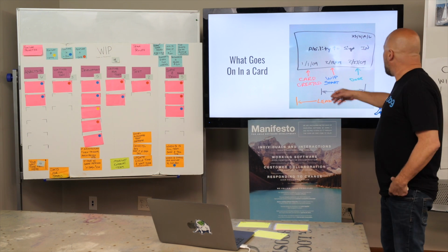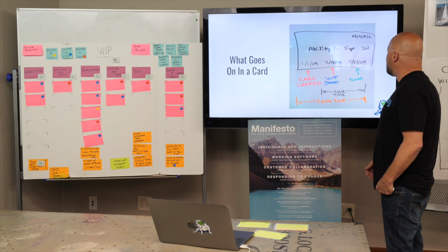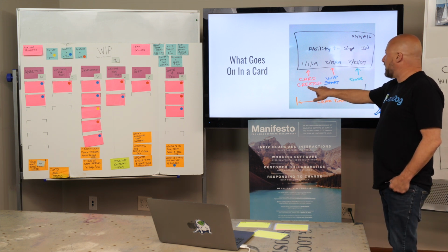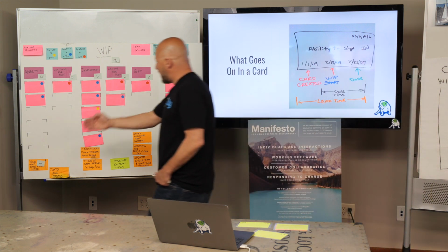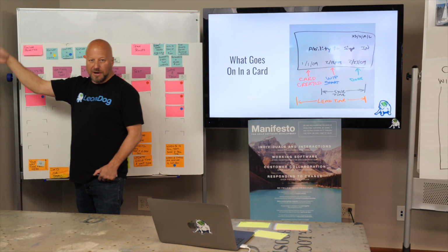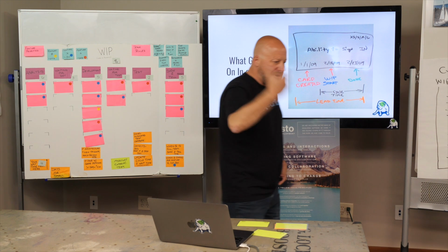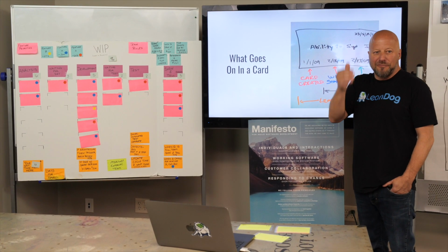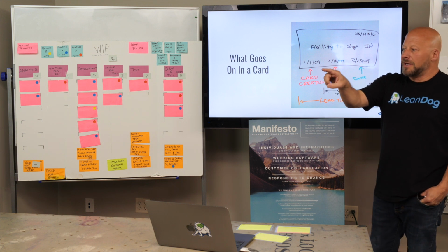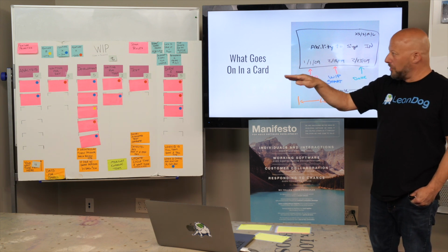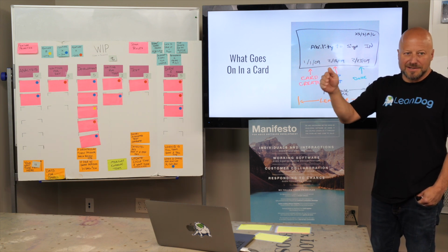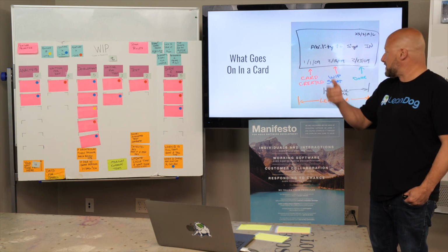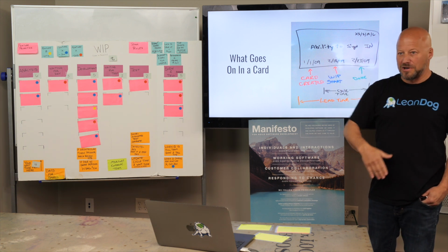So in this case, we have a story card, ability to assign to the system. In the bottom left, we might have a card create date. So over here, when it gets to the analysis, the card got created all the way up down the backlog. Right? As soon as somebody came up with that great idea, we put a card date. It's kind of like a born on date on beer, right? How fresh is the idea? We might have a stage that says, wow, when we get close to WIP, let's revalidate that this is still a fresh idea and a worthy idea. So you could use it and say anything that's too old maybe just falls off the list.